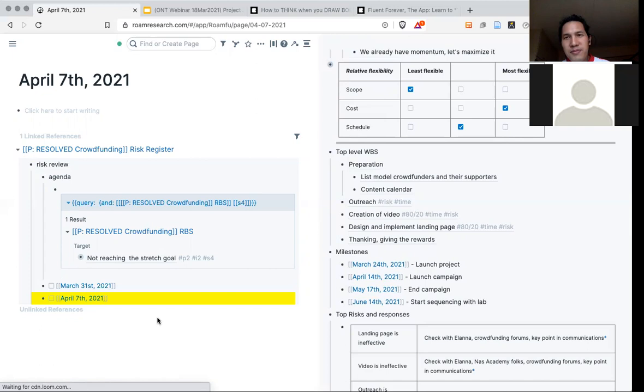If I was doing this project and I could see that this risk was appearing only once a month, my opinion would be that the risk assessment is wrong, and I should elevate the risk so that it appears every week. So you just adjust. That's a good result. I'm happy as well with the discoveries that we had today.